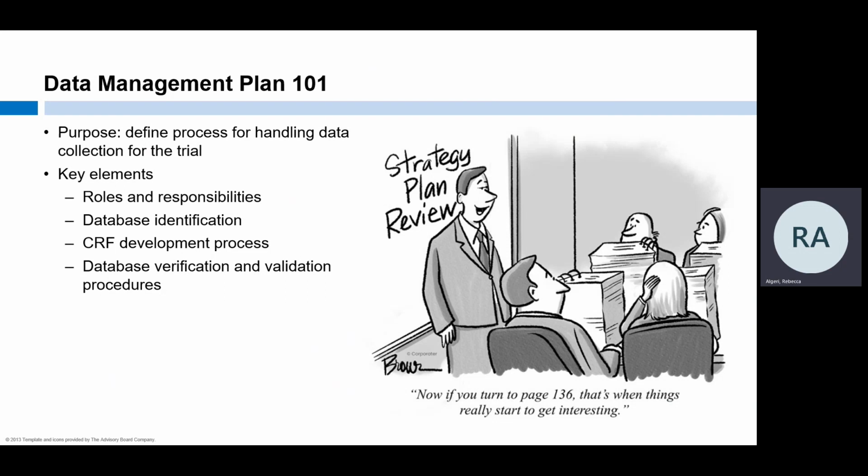Most of us are familiar with academic REDCap, which is an immensely powerful tool for researchers. However, you should be aware that this version of REDCap is not Part 11 compliant and would therefore not be appropriate to use on an IND or IDE study. Discuss your needs with the appropriate contacts at your institution to identify the right database for your project.